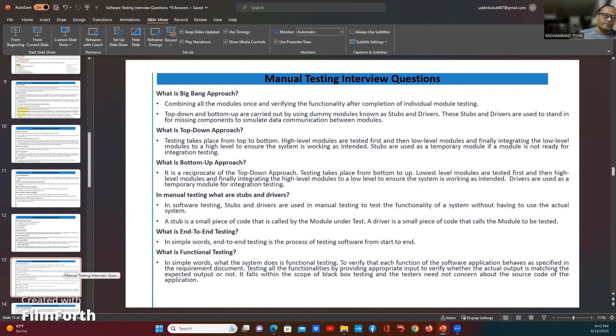So before you release to the customer environment, the customer needs to test it and accept it. That is called acceptance testing, and it is the final one. It is formally conducted to determine whether the application is developed as per requirement or not, and it allows your customer to accept or reject the product. This is where we get the approval from the user as well.